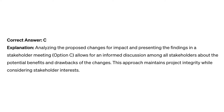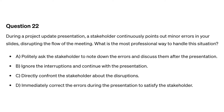Correct answer: C. Analyzing the proposed changes for impact and presenting the findings in a stakeholder meeting allows for an informed discussion among all stakeholders about the potential benefits and drawbacks of the changes. This approach maintains project integrity while considering stakeholder interests.